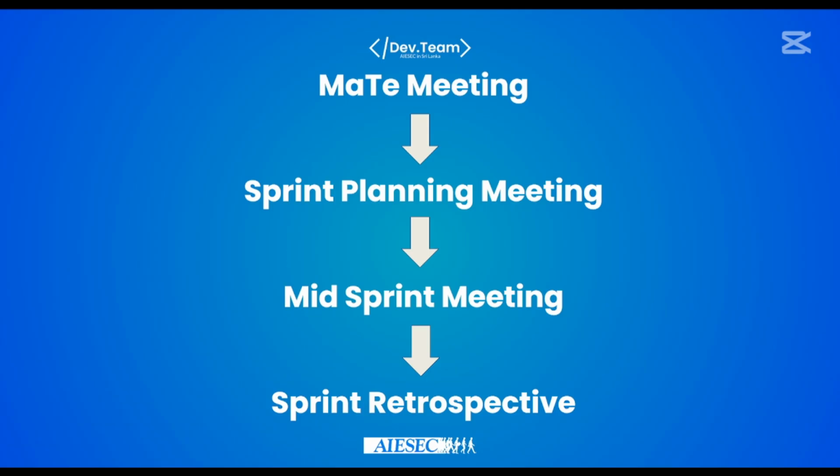It means in the backlog, all the tasks related to that 2 week sprint must be there, right? That's a must. And then it must be assigned to all the members, and deadlines should be set. I mean, not all the tasks should be assigned at the start, but they must be there in the backlog, and then can be assigned to members. And yeah, that's the thing, right?